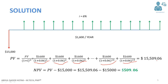The total present value will be $15,509.06. In order to calculate the NPV we have the formula NPV equals present value minus the amount initially invested, which is $15,000. When we carry out these calculations we can see the value is positive: $509.06.